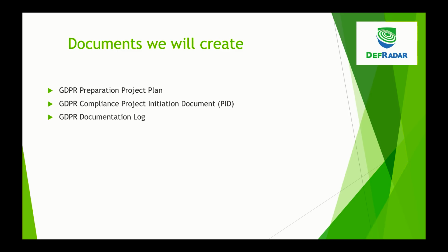We have provided a template that we call the project initiation document that we will fill in, and this one will prompt you to define what you are trying to achieve, who is involved, timescales, budget, progress reporting, etc., so that everyone is clear from the outset about the scope and management of the project. This is also useful towards the end of the project when you come to review whether the project was a success.